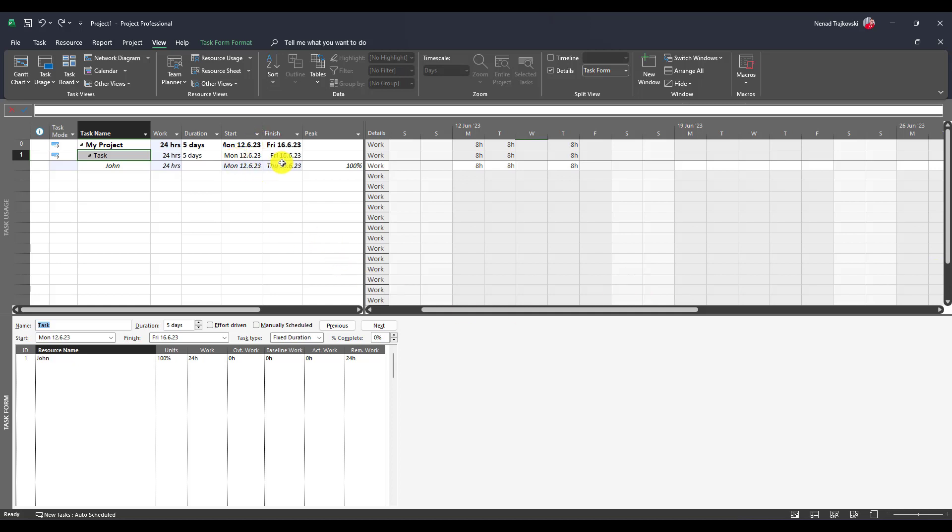When you assign someone who is not available all the time, you should be aware that that person will not going to work on the exception time, in my case Wednesday and Friday. So 24 hours is pretty much fine and enough for John to finish that task.